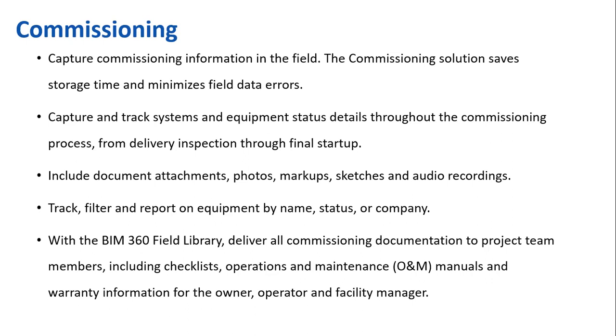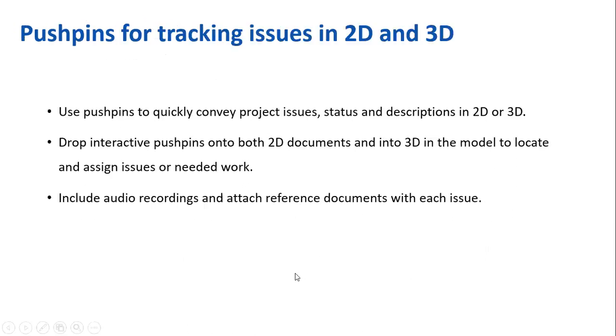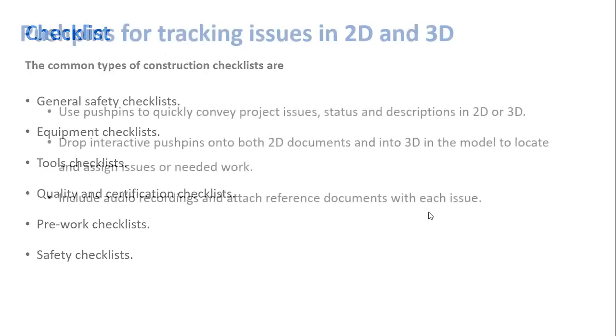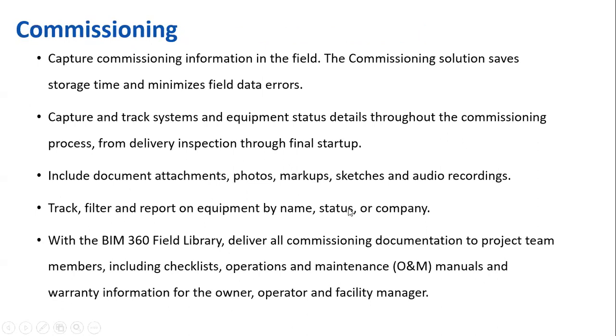With the BIM 360 field library, deliver all commissioning documentation to project team members, including checklist, operations and maintenance manuals, and warranty information for the owner, operation, and facility manager.